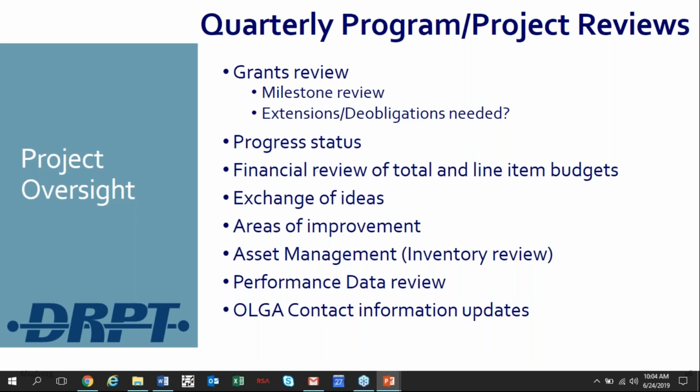Program and project reviews will be conducted by DRBT's transit program managers, and they will include a discussion of each active grant project, including a report on the status of the project, any known issues affecting the project, a financial review of the project, and whether any time extensions, scope or budget changes, or funding obligations are anticipated in the near future. The reviews will also include a discussion of current performance data and asset management information, federal and state compliance issues, including follow-up on issues identified in DRBT compliance audits.